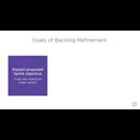Dave then adds, Louise and I have discussed this with Alan, and we all agree that the first half of the sprint planning session, in which the product owner initially introduces the sprint objective, as well as the product backlog item selected to support that objective, is a great model for our backlog refinement sessions. I'll begin by explaining my proposed objective for the next sprint, and will then explain each backlog item that I've selected to support that objective, as well as the rough estimate that I've added to it based on other estimates that I've seen the team assign to what looks like similar work, at least to me.